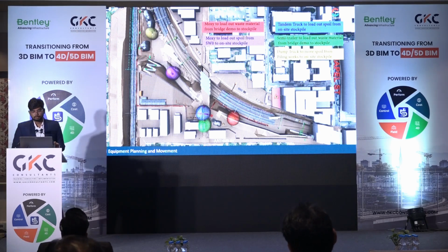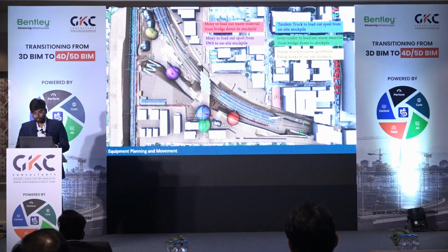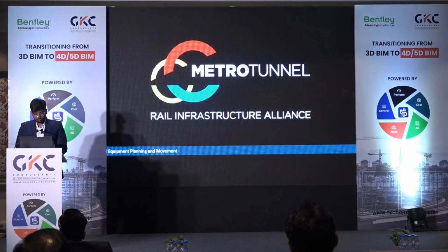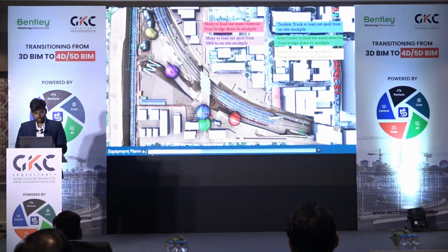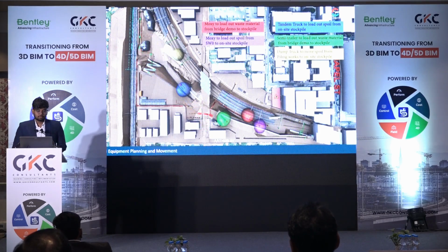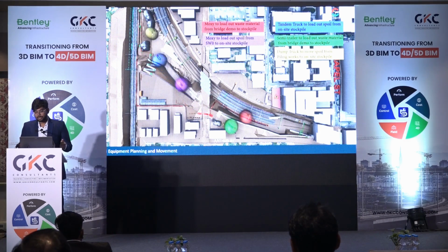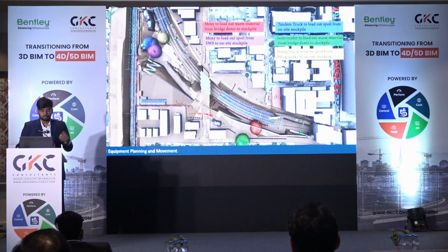Once you start your 4D approach, you start planning how the equipment, your Moxie trucks, are going to enter this site, and how the dumpers are going to take out the earthworks which have been excavated. And while doing so, you start optimizing, checking whether we can run two activities in parallel at different sites, and whether that is feasible. This is where you start saving a lot of time, because now you have the options to take these kinds of decisions in front of you.